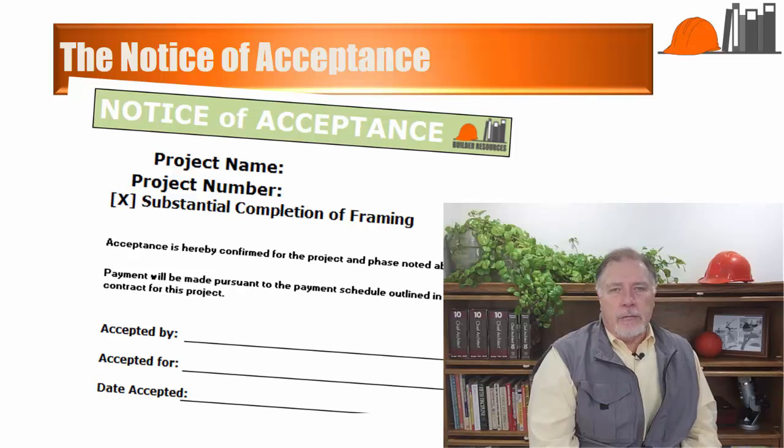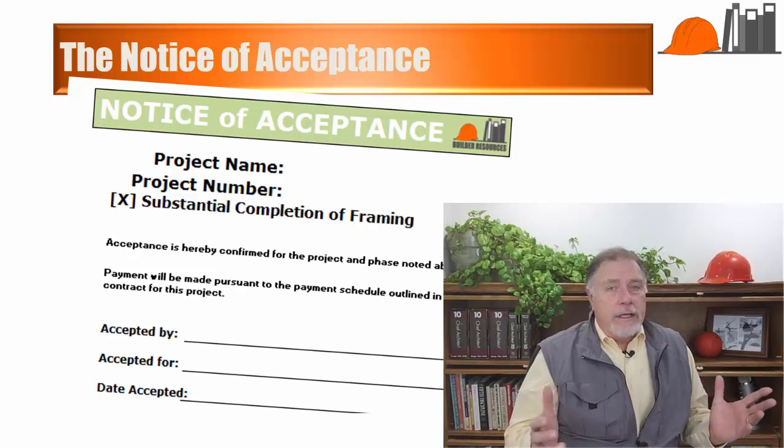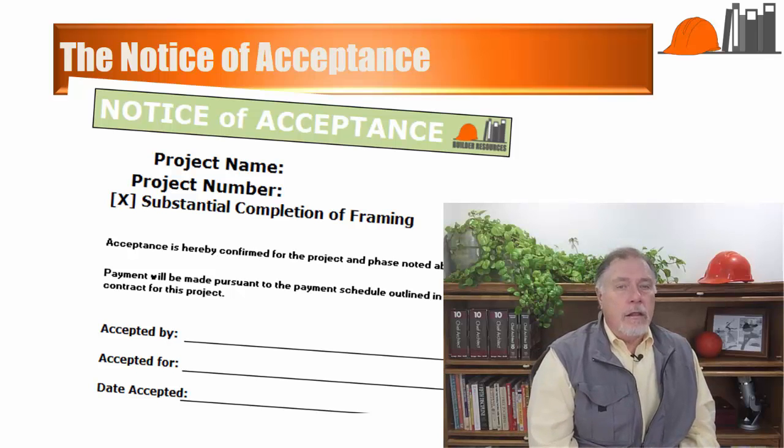If you wait to handle problems until the final walkthrough, you have no leverage with the buyer because you are on the hook to your vendors and your subcontractors for the labor and materials. The buyer can just wait you out. That is an uncomfortable situation to be in.